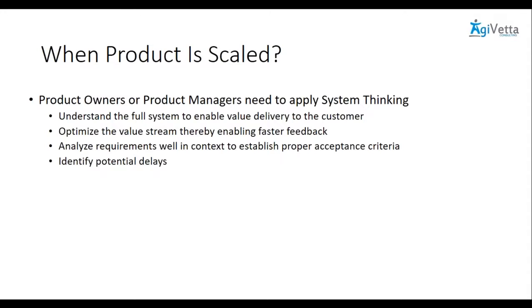One major requirement to be done by, for example, 4 teams at any point in time, any team which is working slow will impact the delivery of all 4 teams. So we know this, that the fastest delivery time is equal to the slowest integration point, and that could be any one of the teams. That could be because of any one of the teams.